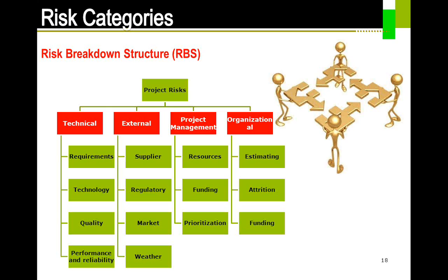To give an example, when it comes to technical risks, requirements, when I say requirements, not necessarily business requirements, the technical requirements. Somebody says that the web page has to come within 1 second. And then we can always say that there is a probability that if the number of users is more than 500, the website will take more than 1 second. So that is the risk.